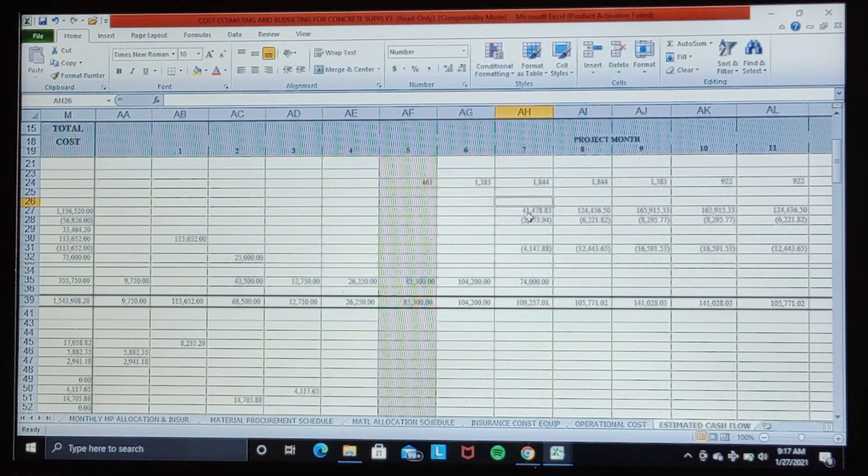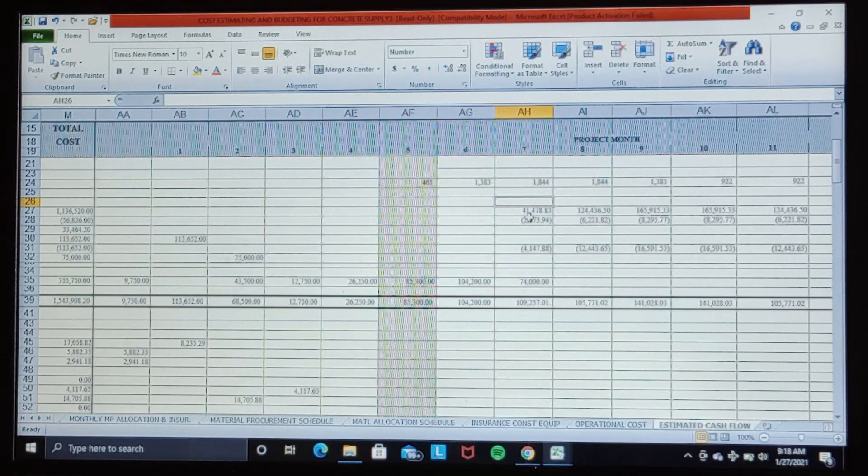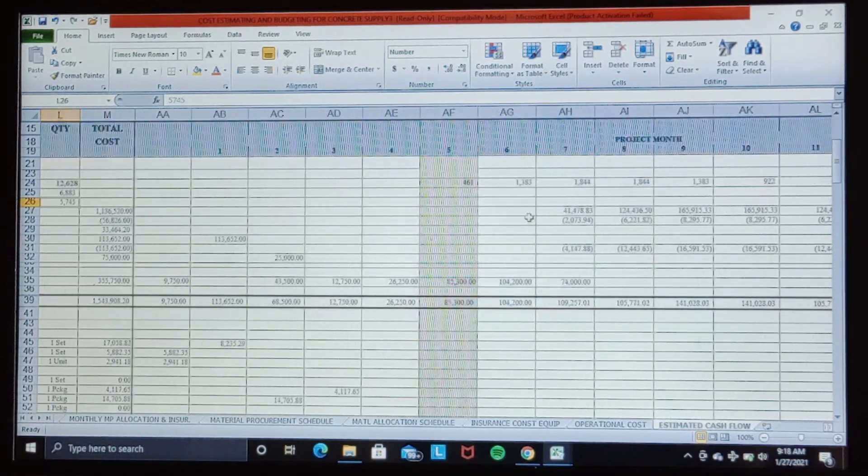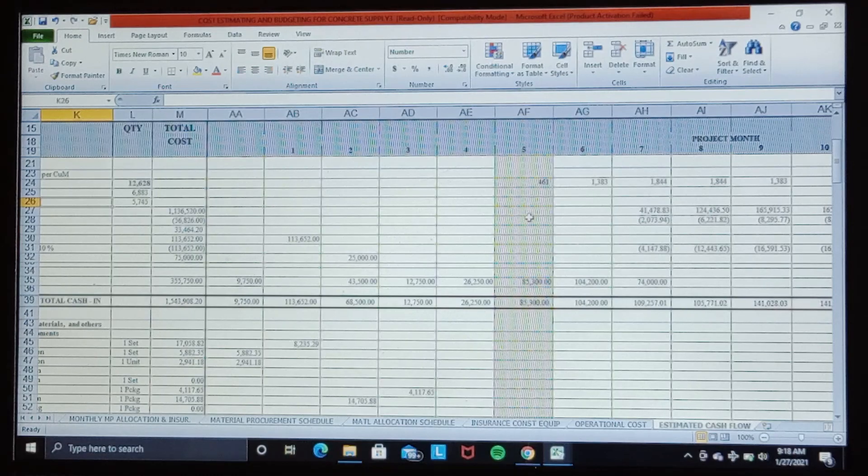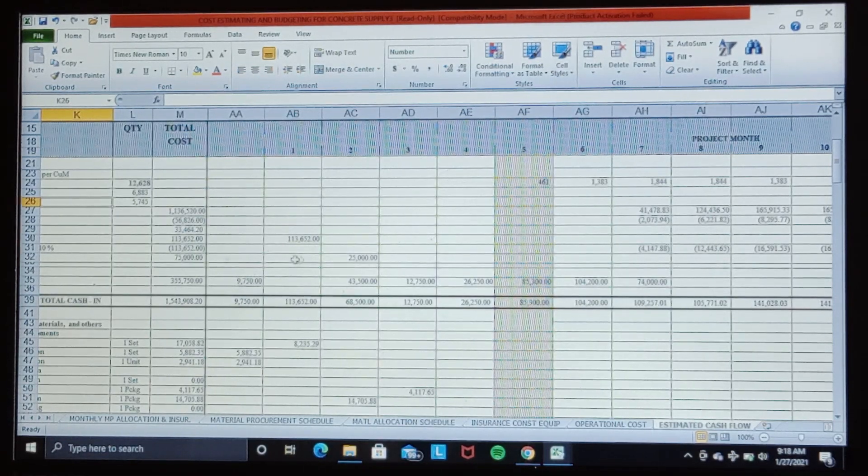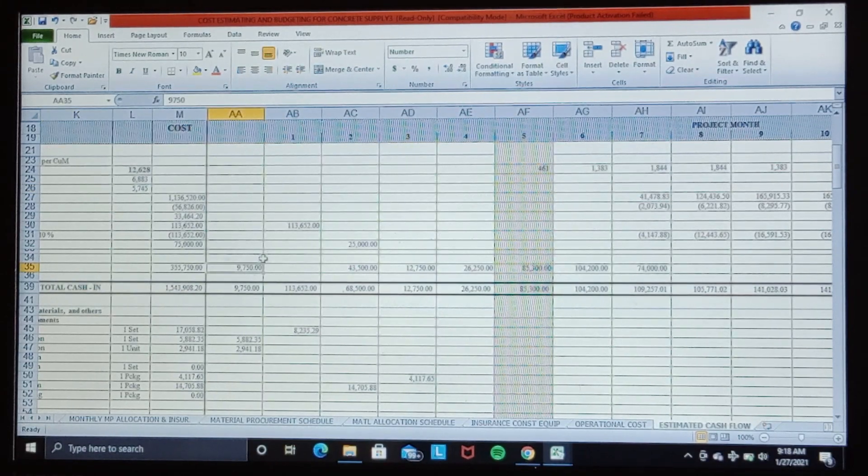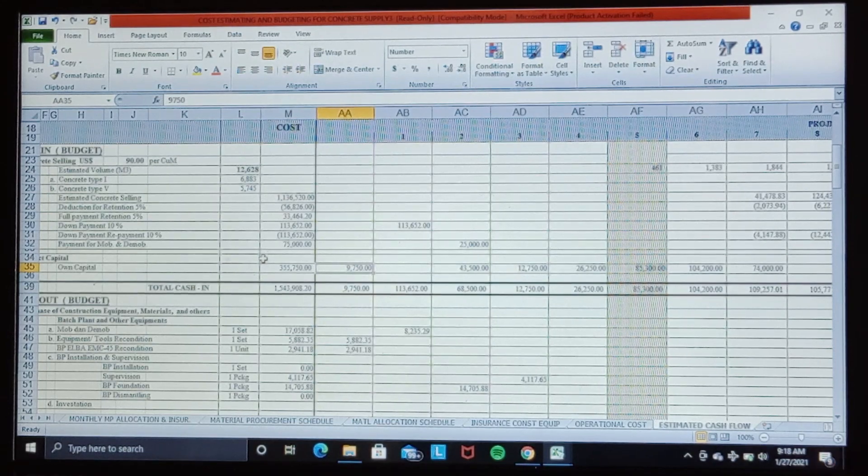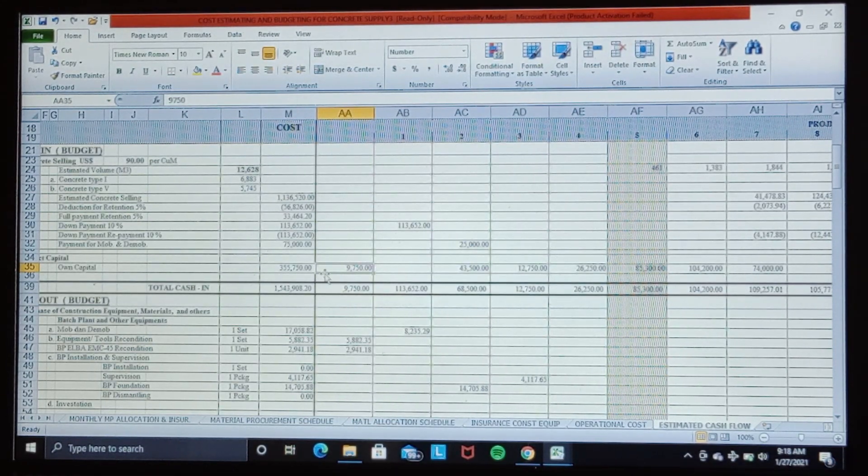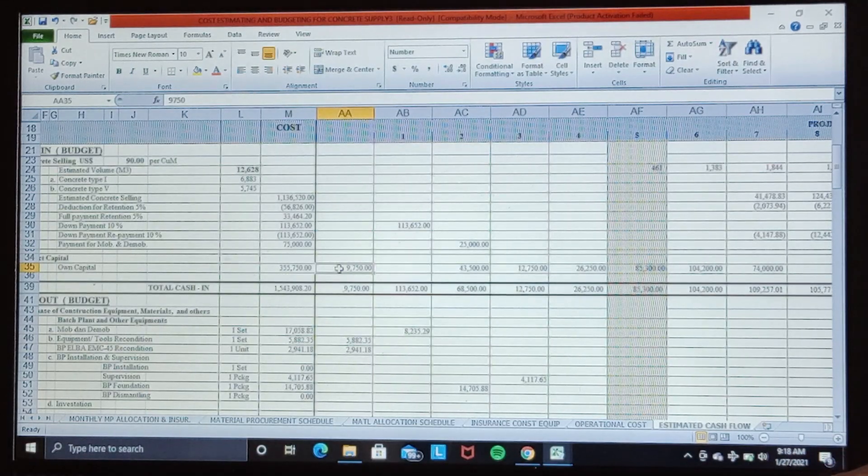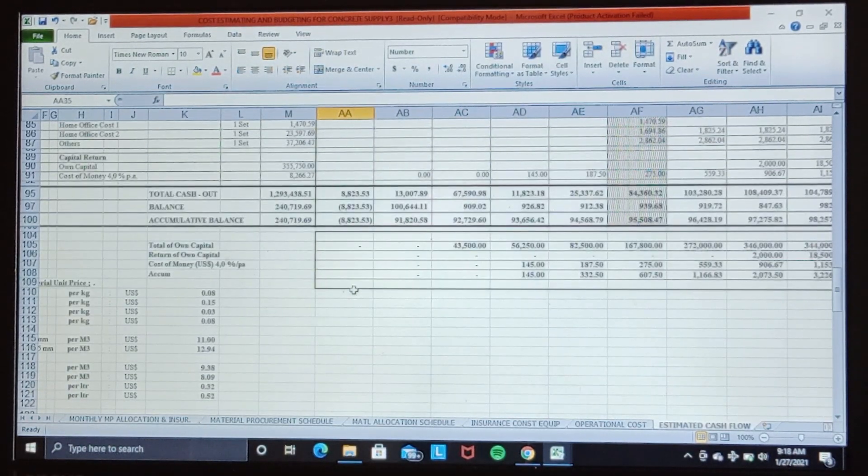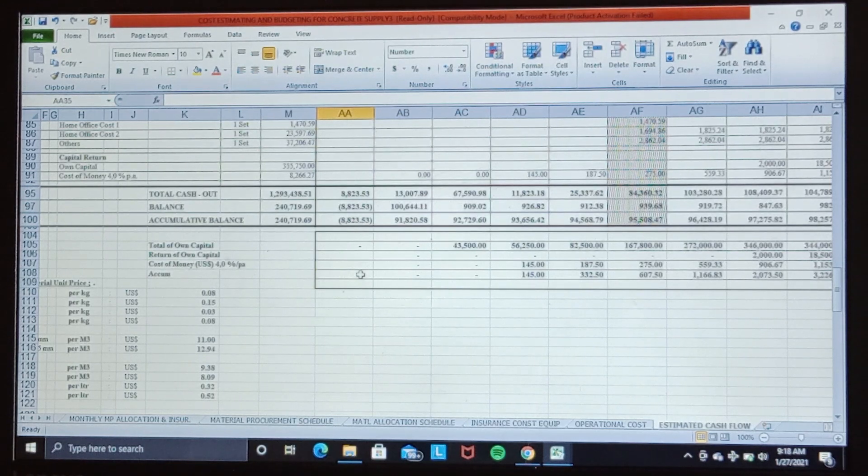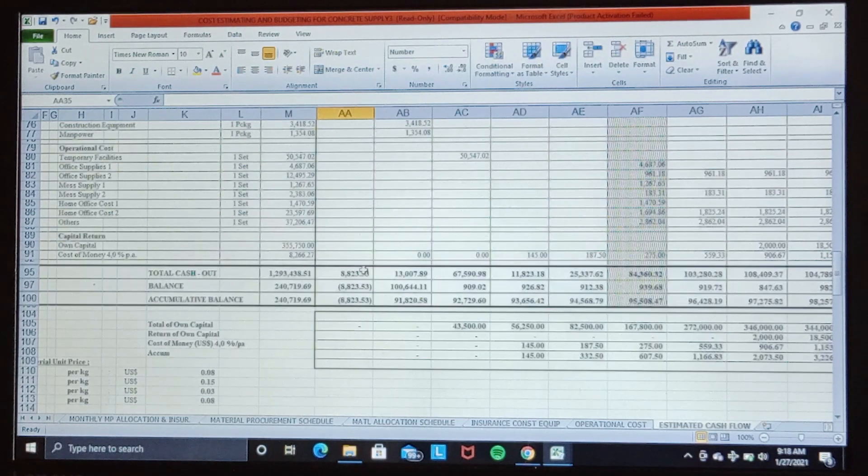However, due to project cycle, when the cash flow condition is minus—when the cash flow condition is minus $8,823—then we cover this, we cover by our own capital.